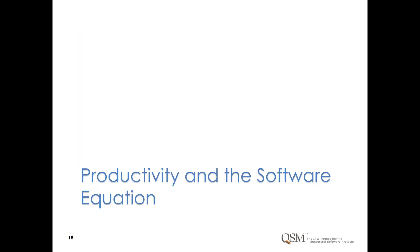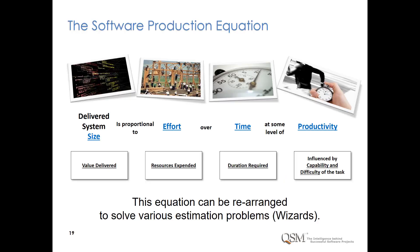The software production equation is at the heart of SLIM tools, based on Larry Putnam Sr.'s original work. The size of the system — the value delivered — is proportional to some amount of effort applied over some amount of time at some level of productivity. For straightforward estimates, inputs are size and productivity, and outputs are time and effort.